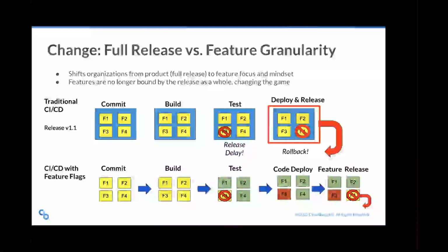So in our example, the release has 4 features. At the testing phase, feature 3 has more bugs than anticipated, and that causes the release as a whole to be delayed entirely until it's fixed, getting the release as a whole off schedule. Further, once the release is deployed to production and all customers have received it at once, they realize that our feature 4 does not work as the users desire, and it's bad enough that we have to redeploy the entire release after it's fixed.